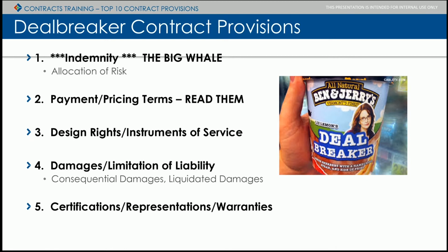It's not commercially reasonable for us to have more risk than the party upstream of us in the contract. But at the same time, and I see it a lot, we shouldn't be pushed down more risk than the owner has with the architect. We want to stand on an equal playing field with our business partners, and that's the goal that I try to get us to when we're negotiating contracts.